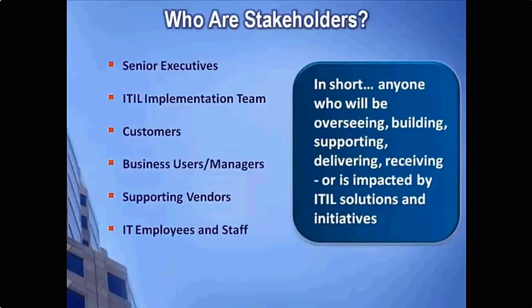The reason for identifying who these stakeholders are is that as we begin our implementation effort, we're going to also focus on efforts around how do we manage the expectations of these stakeholders. Communicating and managing our stakeholders will by far be the largest task in your implementation effort among everything else that you end up doing.